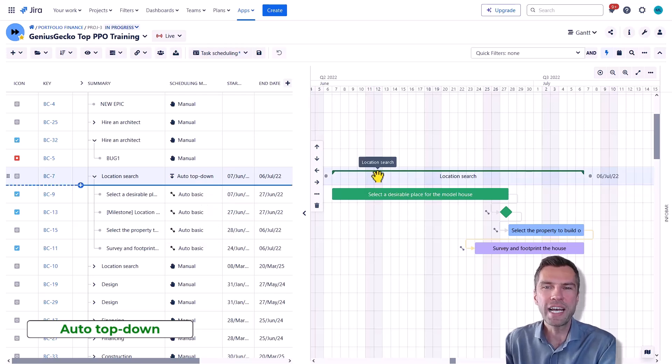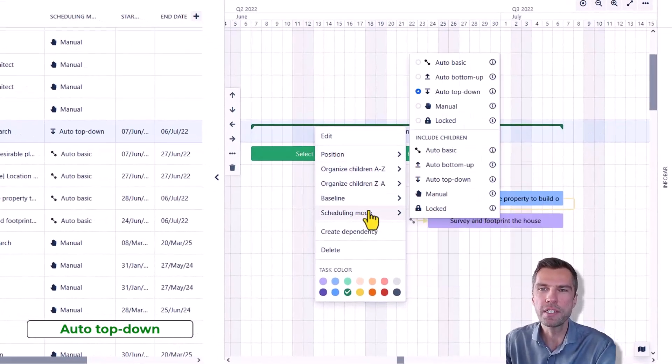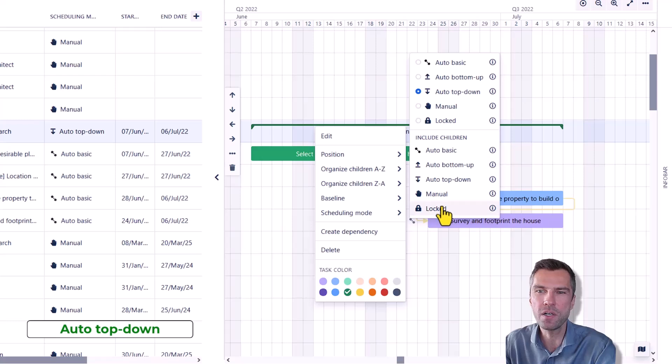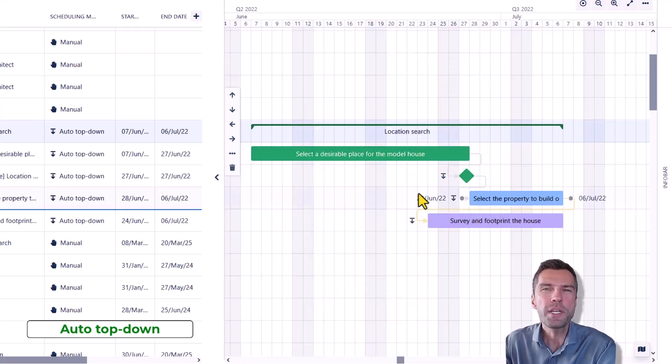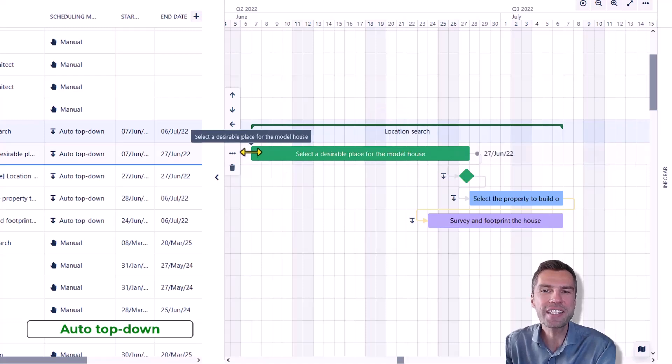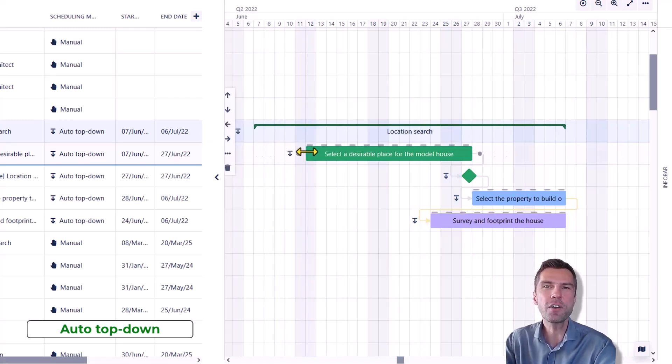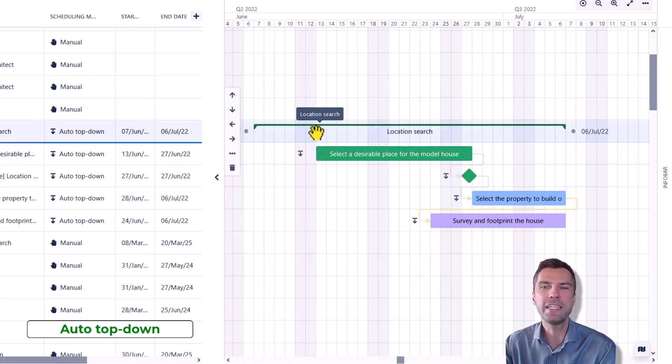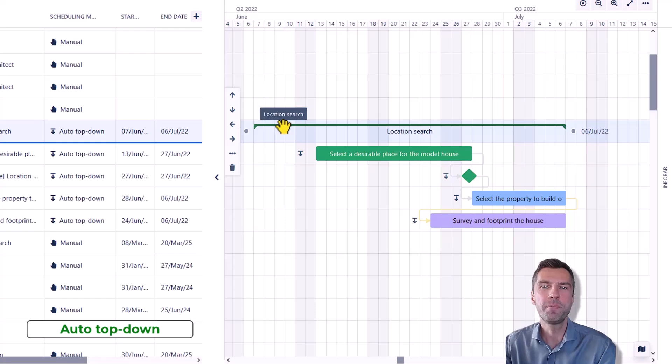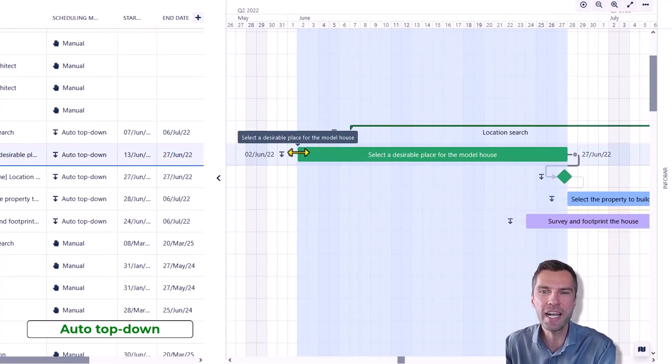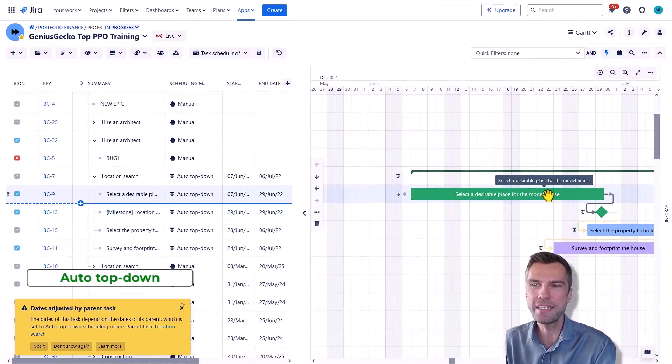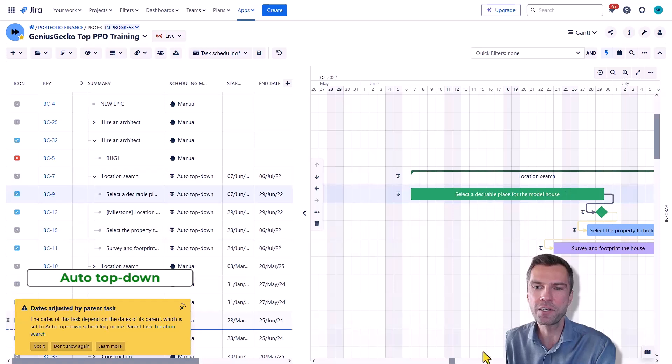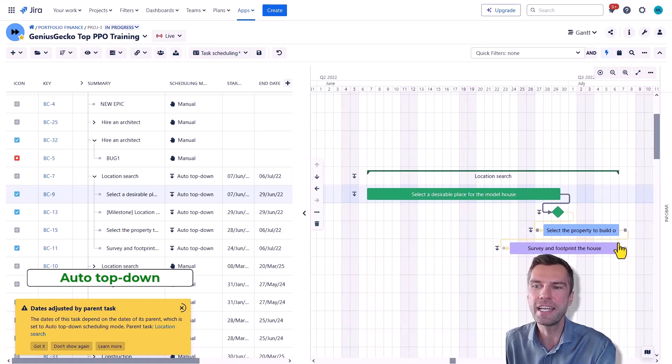Starting with auto top-down, let's change to a simple scenario when all the children are also using this mode. So here the dates of the child tasks are automatically adjusted based on the parent. They cannot start earlier than the start date of the parent and accordingly they cannot end later than that date.